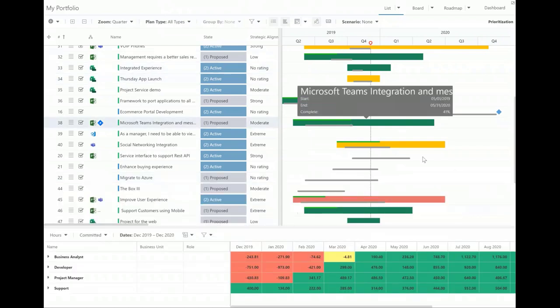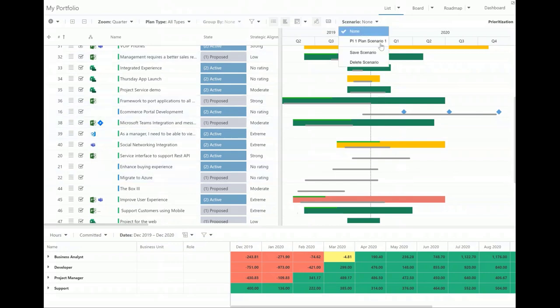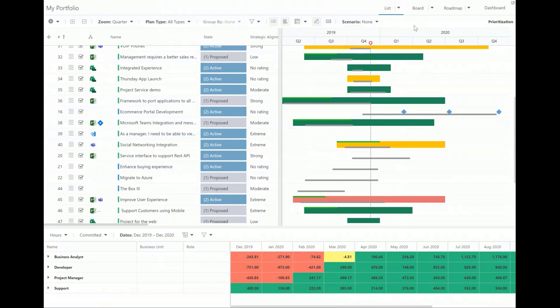Once you get a scenario that you like — a plan that's going to work where you're staying within your budget and resource constraints or pretty close to it — you can save that as a scenario and come back to it at any point. Maybe I save a couple of scenarios: Scenario A, we're not going to do these five lower-priority things; Scenario B, we push them out two quarters. Then as a business we can make that choice of which scenario we're going to go with, commit to that, and move on to the next step.